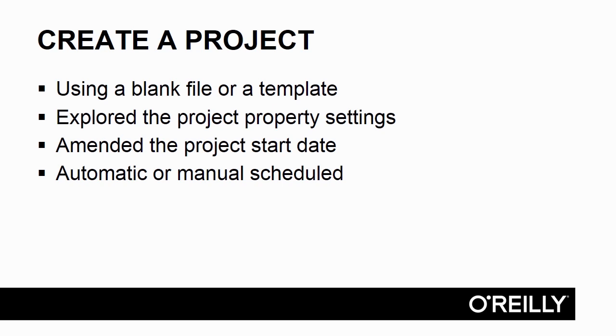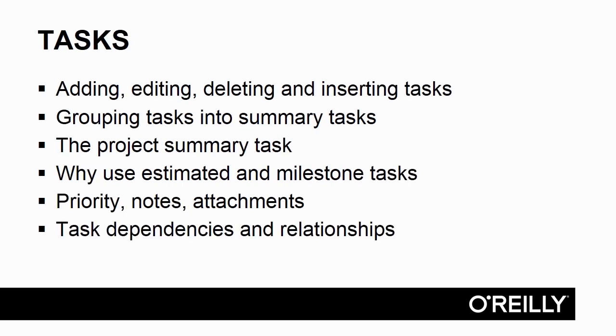By now, you would probably appreciate that my personal preference is for automatically scheduled tasks, and then the driving force for each of your tasks is the project start date and then any dependencies on other tasks. Tasks, which are the mainstay of your Microsoft project, were a big section.